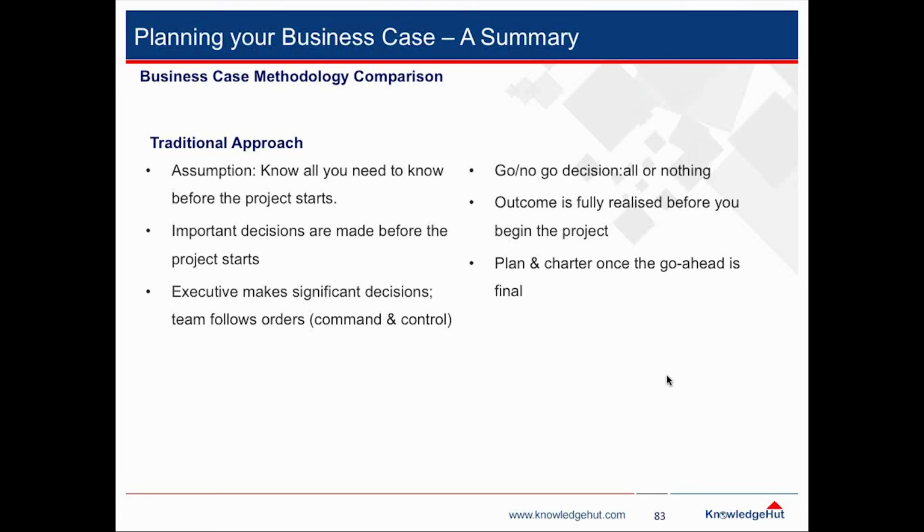A mining project or a huge public sector project needs its business case to depend on some of this knowledge at the beginning. It cannot just evolve. Whereas a software development project, for example, once you have worked out the architecture needs, can be a bit more flexible on solutions that emerge, and here you can afford to delay some of the decisions.